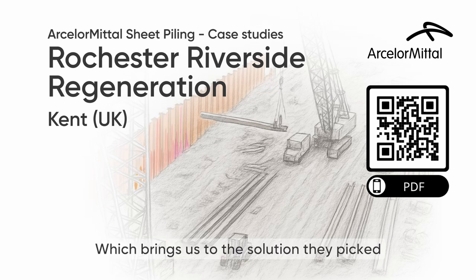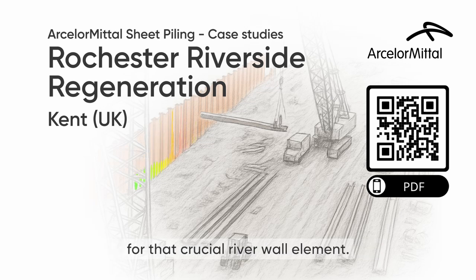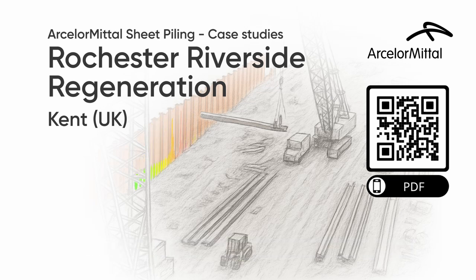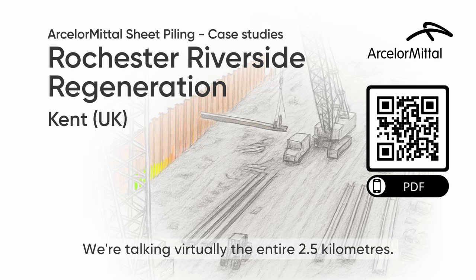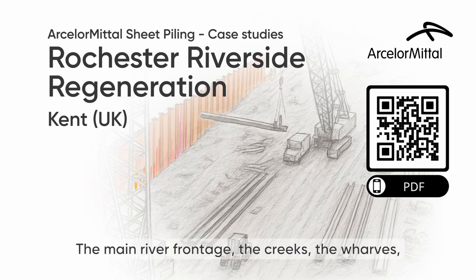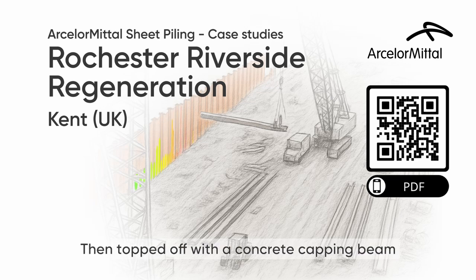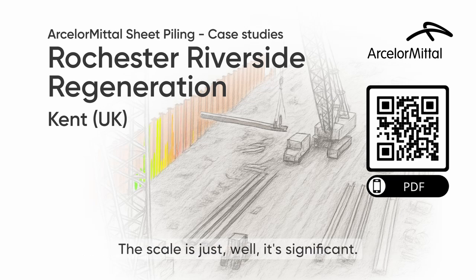Which brings us to the solution they picked for that crucial river wall element. Steel sheet piles. Yeah, exactly. Hot-rolled steel sheet piles. They looked at various options, obviously: technical performance, cost, environment, safety, all the usual factors. And steel came out on top. Yeah, it was seen as the best technical fit and, crucially, the most cost-effective approach for the specific site. And we're not just talking a small section here. Oh, no. We're talking virtually the entire 2.5 kilometers. The main river frontage, the creeks, the wharves, all secured by this continuous steel wall. How deep do they have to go? Roughly 15 meters deep on average, then topped off with a concrete capping beam to tie it all together. The scale is just, well, it's significant.